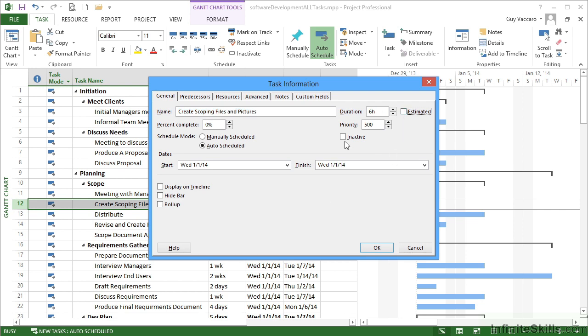Whilst we're in the task information, one other thing to point out here is the ability to change the priority. So all of our tasks have defaulted to 500 and we can put anything between 1 and 1000. Now the priority itself does not make any difference at all until at some point in your project plan you either decide to filter by the task priorities, or there's a clash of resources and we need to decide which task to do first, in which case the one with a higher priority number would take over. So you can change that value here. They're all in the middle by default at 500 and you can go up or down from there.